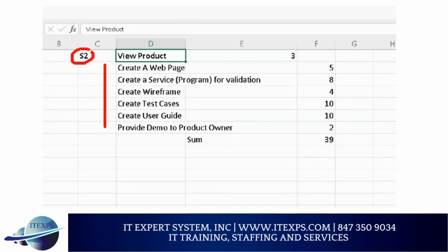When you create a subtask, the screen will be a little bit up and down, so it will be a little difficult. But before you go to subtask, you may want to decorate the story because there are a few things we did not do. One, story point. We did not do story point, right? So it's a good idea to do story point before you go, because this software which you are using, JIRA, can automatically create burn down chart, burn up chart, and velocity chart if you have story point and task defined. Did we write story point yet? No. So we need to do that.